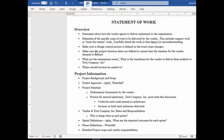Another thing: you want to make sure that project duration dates are defined, and you also want to confirm from the vendor side if they have the resources necessary to do this project in this timeline. A lot of times vendors present a very nice presentation during the sales process, but they haven't really considered the back end because they're eager to get your money upfront. So make sure they really understand the timeline and that resources have to be available at specific times.